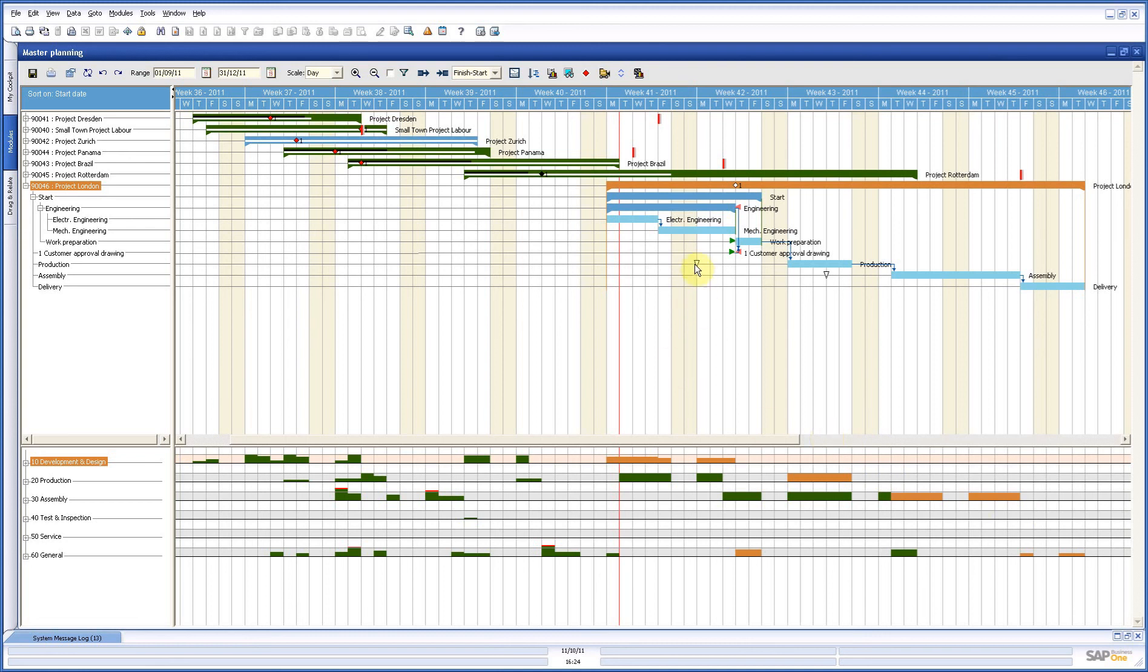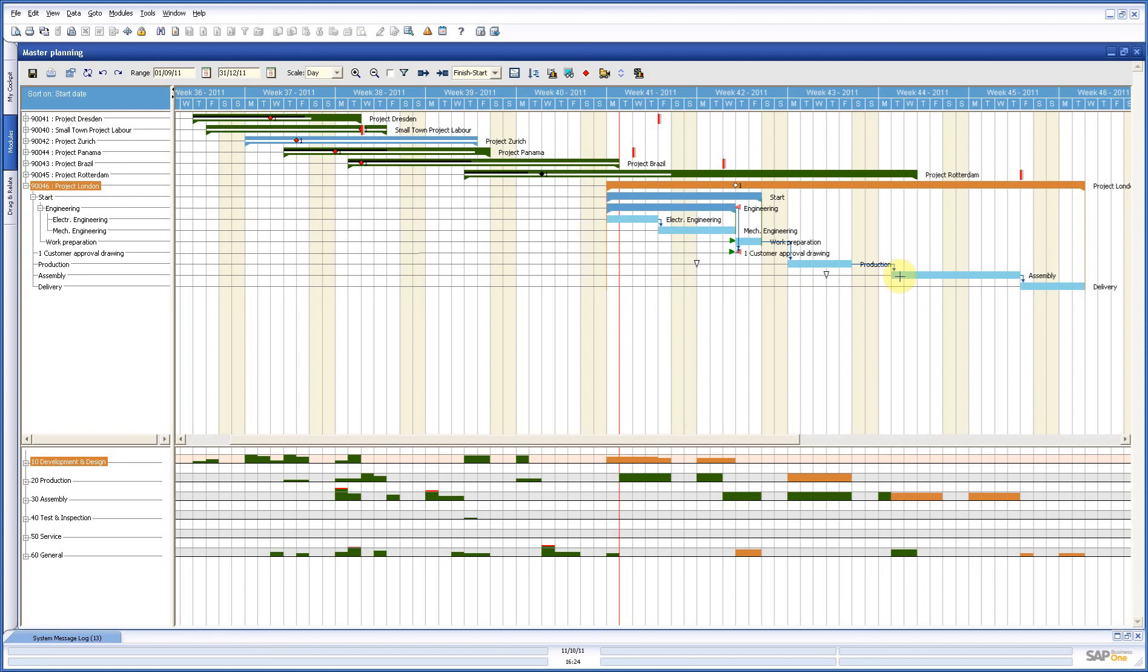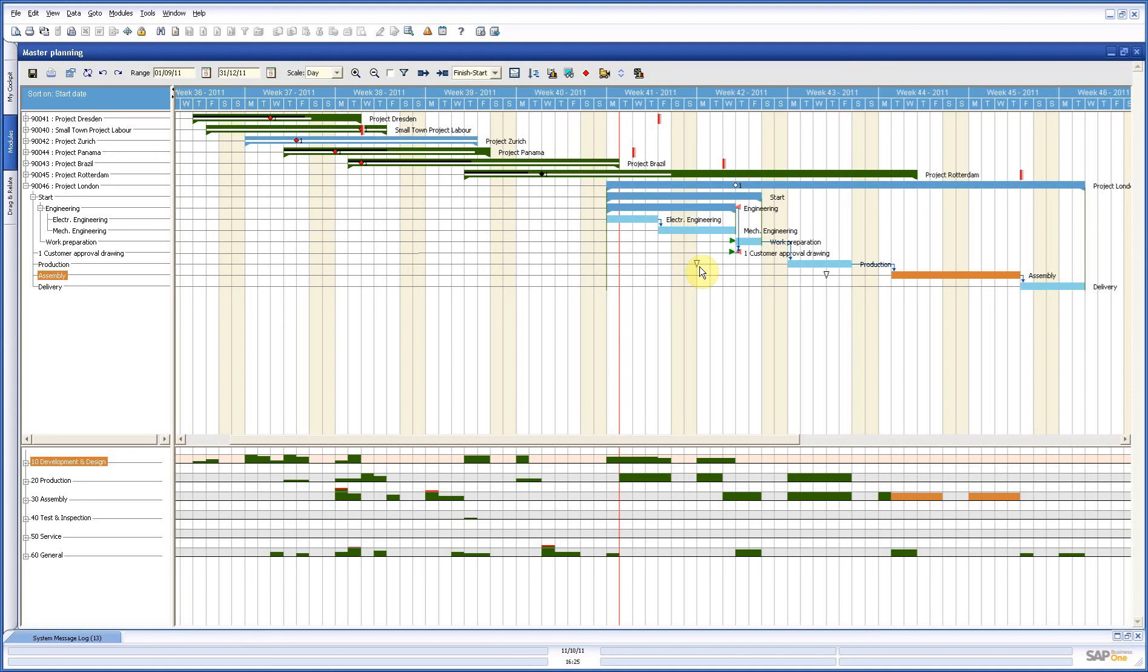Another thing I see here are those white triangles and those white triangles refer to the materials I need for these two specific activities. And these say you need to order at least here or start producing, otherwise you are too late to start this activity with your material. In this case, they are both white, so we have no problem. If they are turned to the left of this red line, they turn red and you can have an alert and you have to see what to do about it.